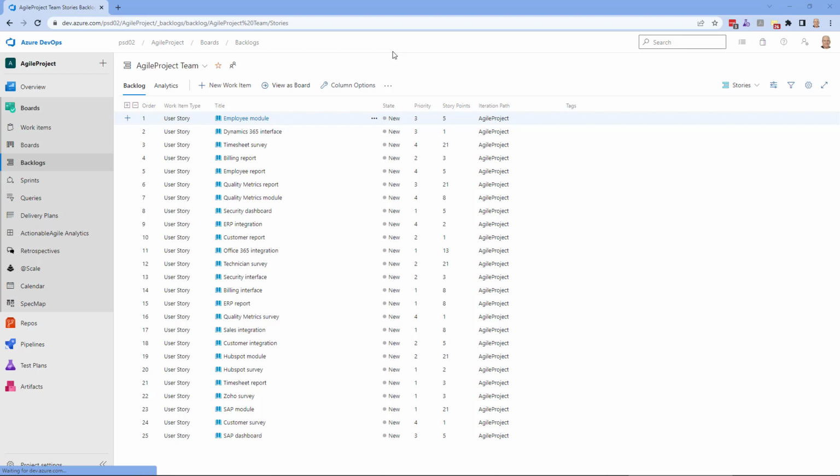Hey, in this video I'm going to answer a frequently asked question about how to order the product backlog by priority. Now this is obviously using the Agile process. We have a user story work item type and the priority column here. And we want to order the backlog so that the highest priority items and the lowest story points are at the top, which would be the highest ROI items, down to the lowest ROI items at the bottom.